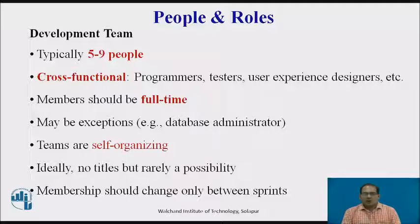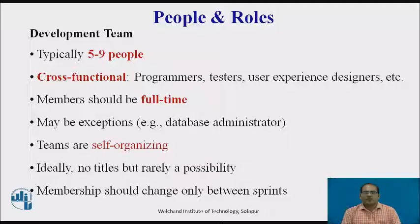The development team is responsible for delivering the product. The team is typically cross-functional in terms of expertise and experience, and the team as a whole is accountable for the delivery and quality of the application. Development teams are also self-organizing, meaning that the team — not the product owner or the Scrum master — is responsible for defining the rules dictating how they work together. The product owner defines the backlog of what needs to be accomplished, but the development team is responsible for defining how it is completed. There are no titles or sub-teams within the development team. Members may have different skills, specializations, and experience, but they all have a voice in the operation of the project and all contribute to the creation of the application.